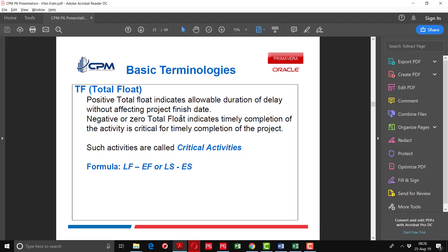Total float is the allowable duration of delay without affecting the project finish date. Negative or zero total float indicates the timely completion of the activity is critical for the timely completion of the project — such activities are called critical activities. The formula for total float is either late finish minus early finish, or late start minus early start.